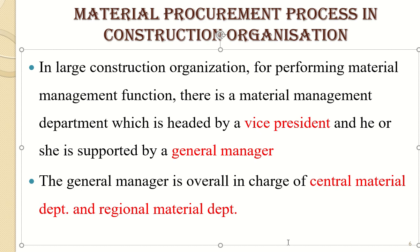High value material purchase and bulk items are handled by the central material department, while the regional material department handles local items.